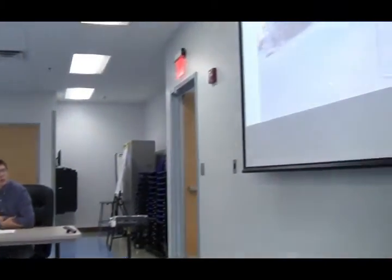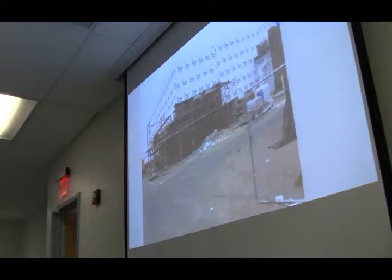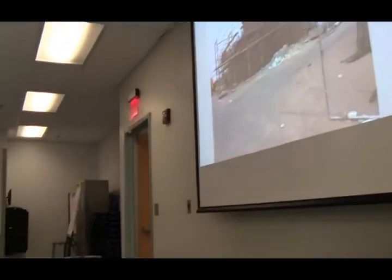Thomas Nelson High School. So the pictures won't show it, but they did install the roof joist yesterday, and they'll be proceeding with the decking, so that'll allow us to get the interior closed in, and the roofing portion is going to start at the end of this month. On the inside, the auditorium seating structural steel was completed and decked, and they're proceeding with forming the concrete pour for the seating to be anchored to. Brick veneer is ongoing. There's actually a mix of brick and metal siding on the exterior, so the brick's making pretty good progress.